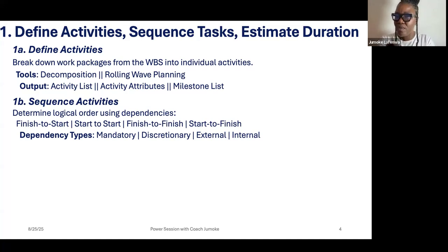So this is discretionary. You can also say no. If they both came together, they will be distracting and it could lead to chaos. So I want the electrician to come first before the plumber. So you, the project manager, can use your discretion on tasks like that. But those that are mandatory, you don't have a choice.